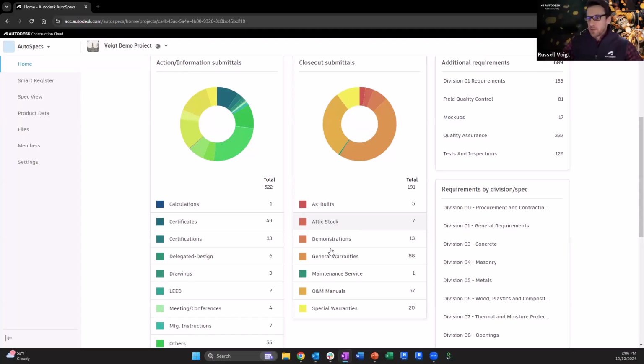So if I'm looking at this, first of all, I can't tell you how many times I saw lead submittals on a project that was not lead. Obviously things get copy pasted from old designs accidentally because a lot of designers are pressed for time too. This is where you can find those and get them out of there during your 60% DD issue, whatever design milestone you're at.